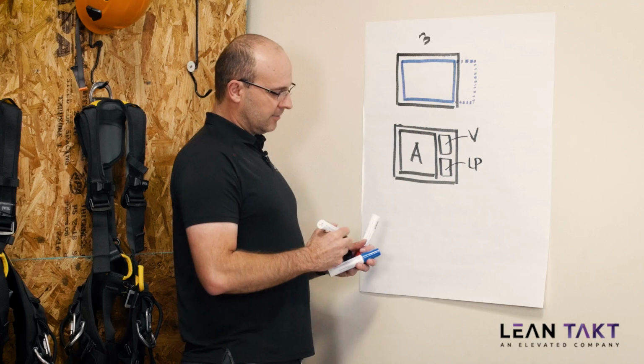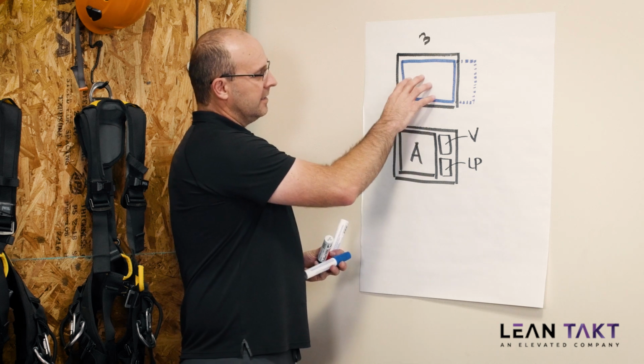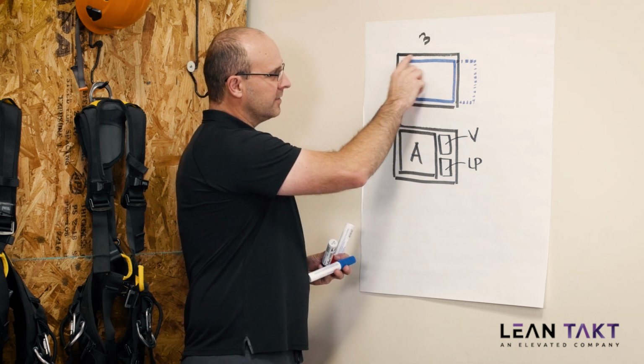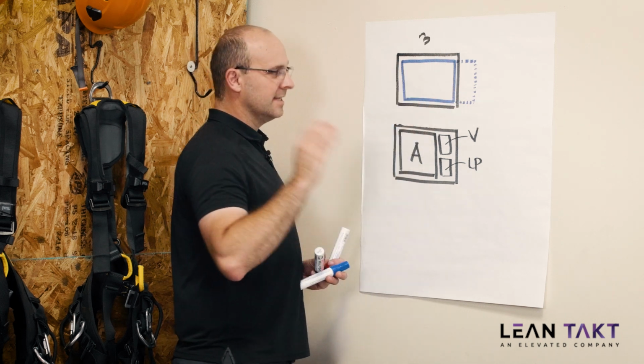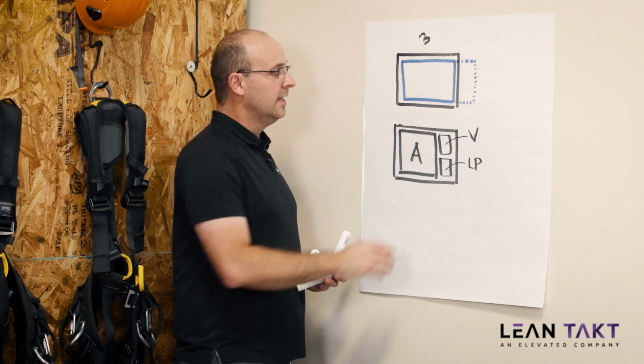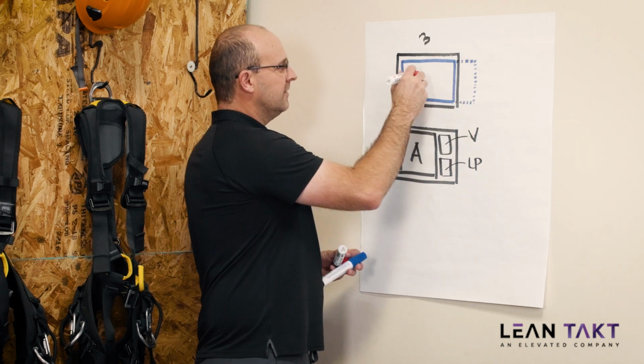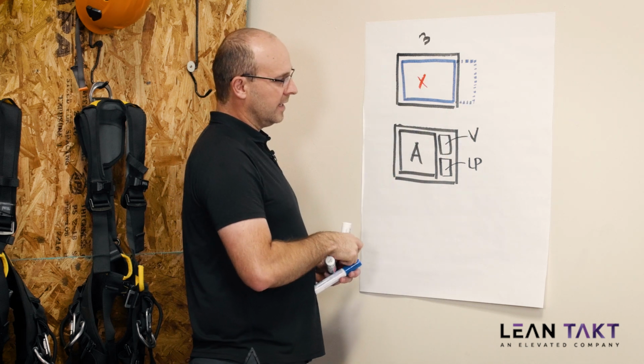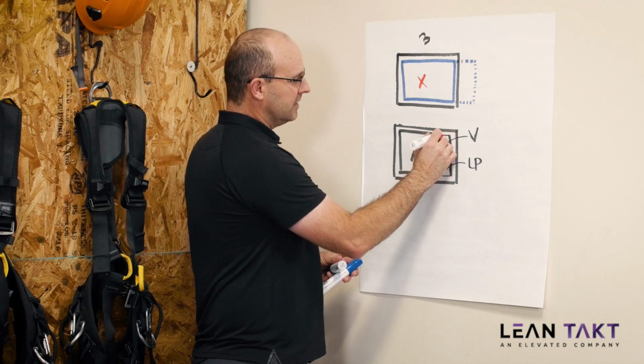So you want to keep that relationship in mind. And if you have this scenario where you've filled up 3 days with 3 days of work and that's it, and you've sized your crew that way, then you could get in trouble if you run into a problem along the way, which I would say you definitely will.